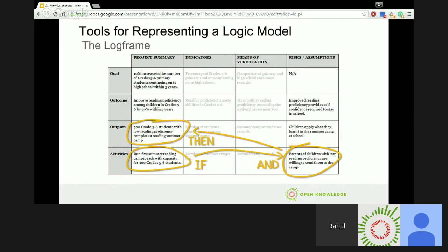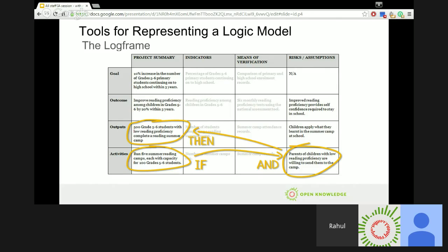By definition, the project team is not responsible for such assumptions. These are outside their control. The team is responsible for producing defined outputs and sometimes the outcomes. We can determine the assumptions by asking what conditions must exist in addition to my objective at each of those levels, activity, output, objectives, or goal levels, in order to achieve the next level. How will each stage be achieved and why is it important?